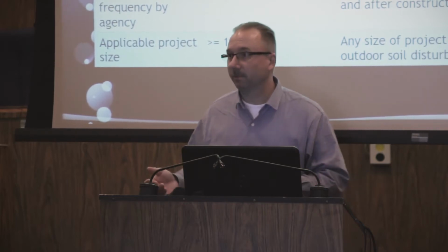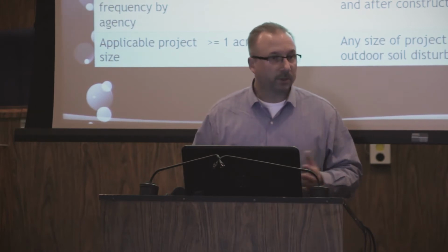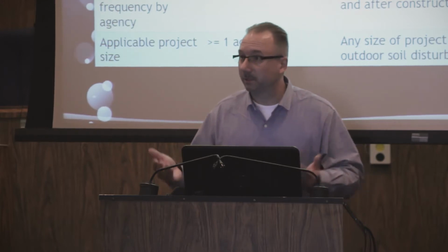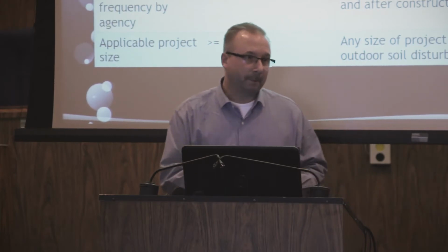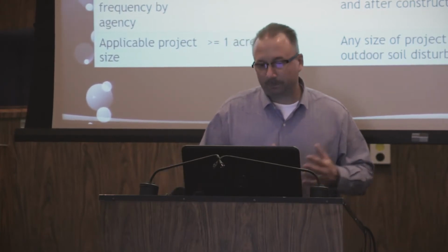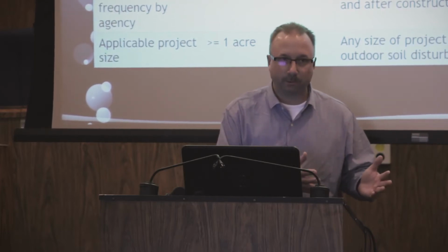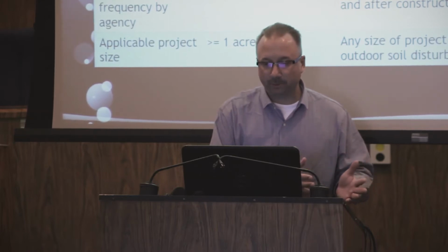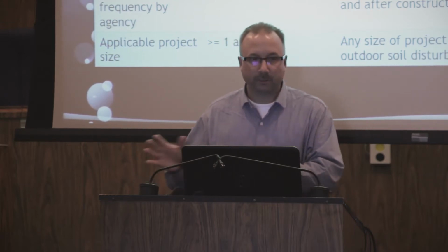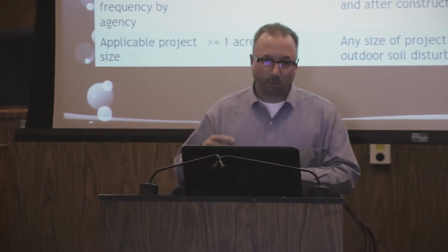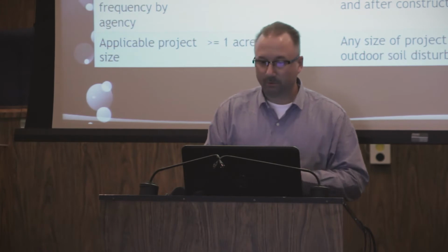And that was one of the requirements under this permit, that municipalities like the City of Chico develop ordinances, municipal code that gives them the legal authority to require these things, because the municipality has no legal authority to manage or to regulate the construction general permit. That's really only the State Water Board has that, but municipalities do not. So the Water Board, understanding this, when they wrote this municipal permit, said, okay, you're going to develop municipal code that requires that any project disturbing soils has to submit this erosion sediment control plan.